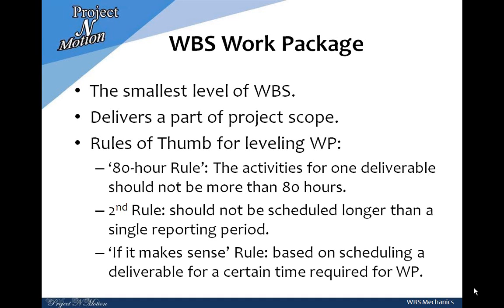For this, we have some rules of thumb. The first rule is the 80-hour rule, which says that if a deliverable requires activities of less than 80 hours, it should be at the last level of WBS — that is, a work package. The second rule is based on the reporting period: if the 80-hour rule doesn't work, the work package duration should not be longer than a reporting period. Since work leveling varies from project to project, the last rule gives complete command to the project manager. This rule is named the 'if it makes sense' rule — if the manager is unable to classify work packages according to the first two rules, he may go with whatever makes better sense.